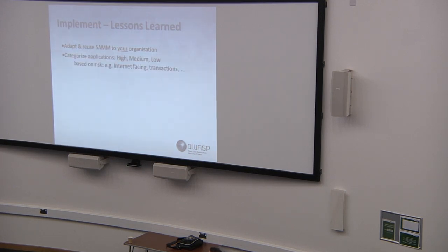Also, what's really key here is don't do this for all your applications at the same time. That's not going to work. Focus on your high risk applications first. Recheck your progress, derive lessons learned at each iteration, and make sure that you're ready to adapt your planning while you're implementing. That is really important here.